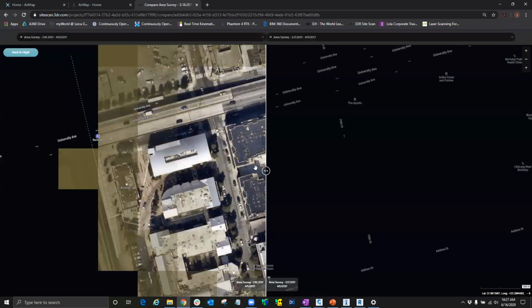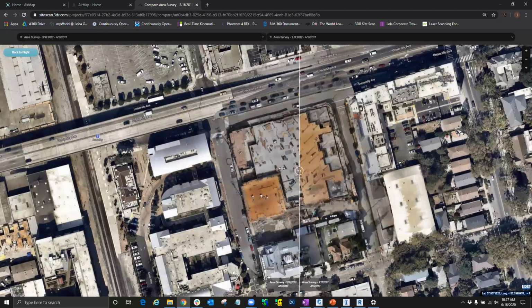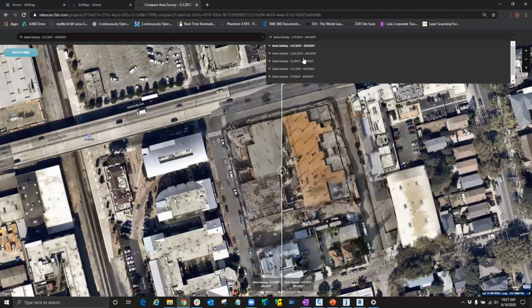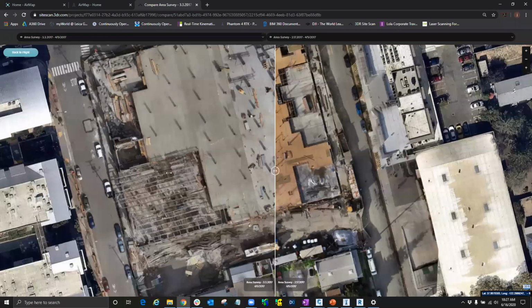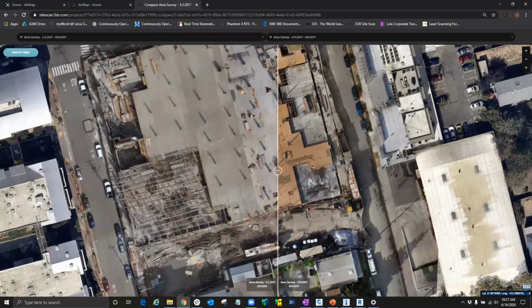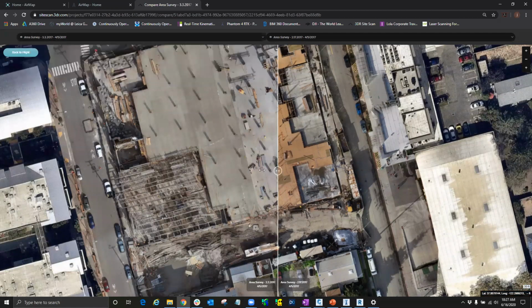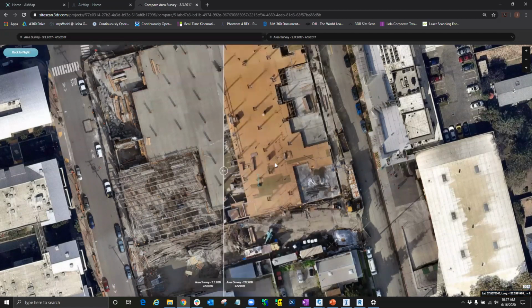Now let's go into this timeline feature. So what I can do here, I mentioned you can do multiple flights. So we can set, say like this date, and sure, we'll keep this one the same. So over here, they have this little slider tool where we can go back and forth to be able to see that. And it doesn't have to just be flights either. We can upload our PDF drawings. So if you have something in there and you're curious to see if they're following the plan or the site layout, or if they've had to make a change, you'll be able to see that accordingly.